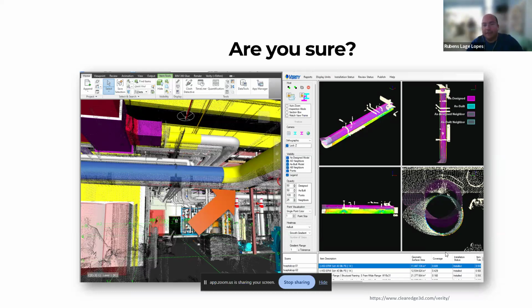And if it's really a red flag, then the construction team has to go back there and adjust that. But if it's not, if you can live with that, you can adjust the design where it's cheaper and then bring it to the site and keep going. And you save time because you already prepared, it's not a surprise.